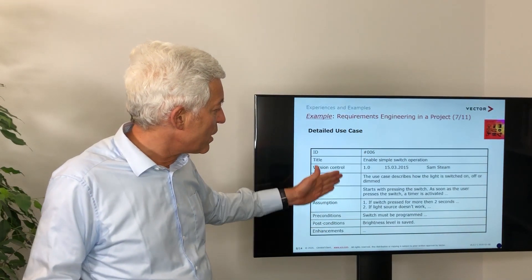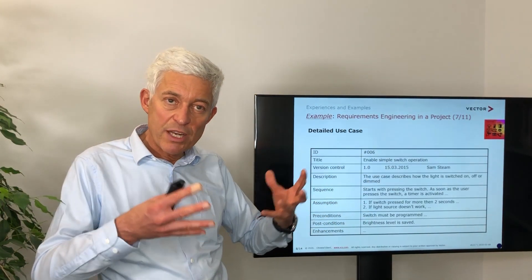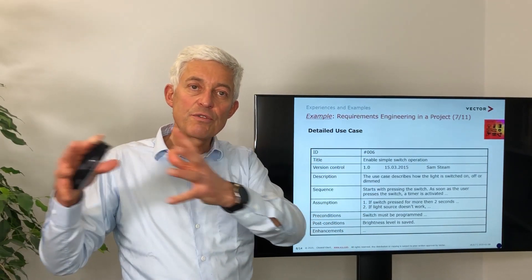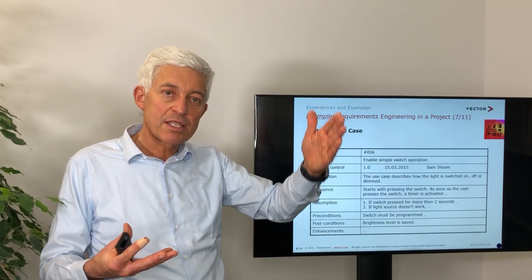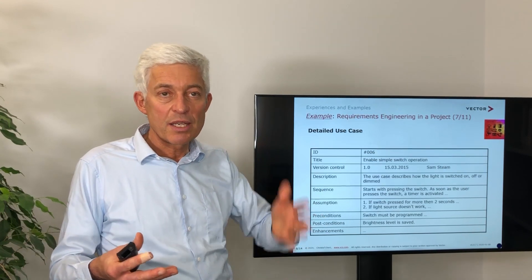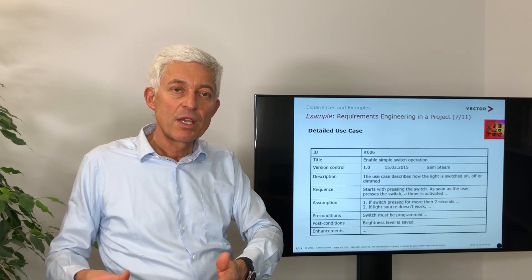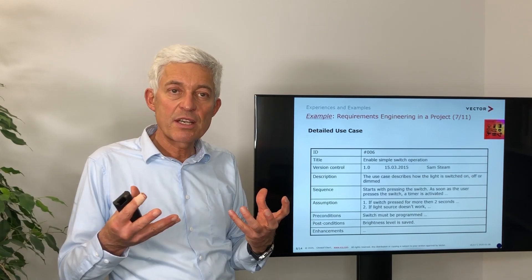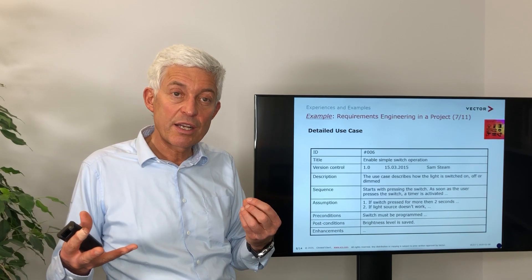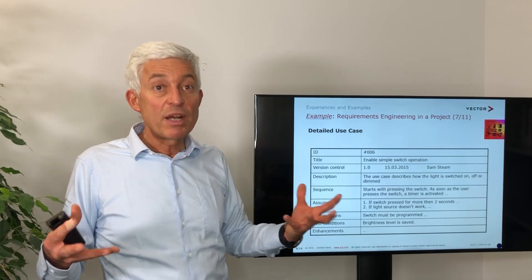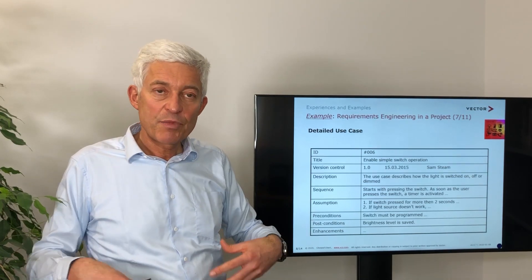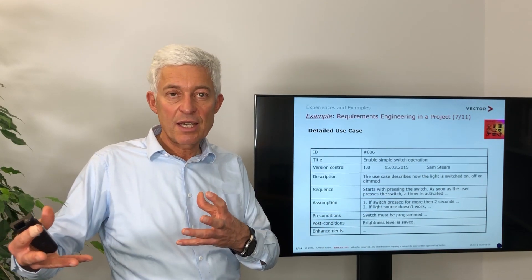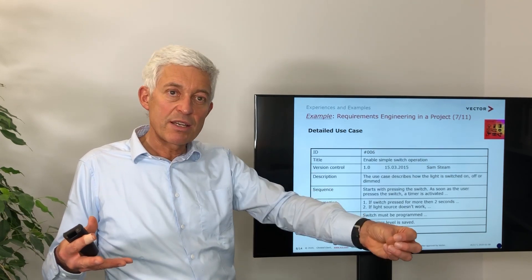This is now a full template which you can imagine also in a tabular structure where different requirements always fill the same content: a requirement has a number, a unique identifier or key, a source, a date when it was created, a description, an effort estimation, a prioritization, a cost-benefit analysis and trade-off, a value for the market, and also links into what would be the design or code implementing this requirement, as well as the test cases used to check whether the system later on implements the requirement.